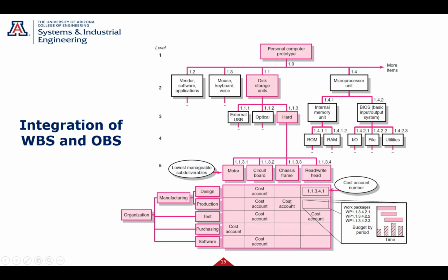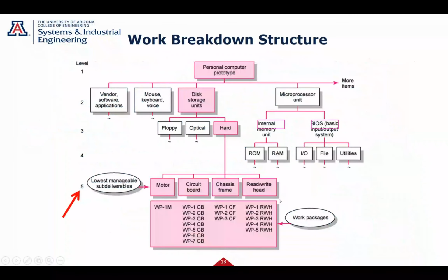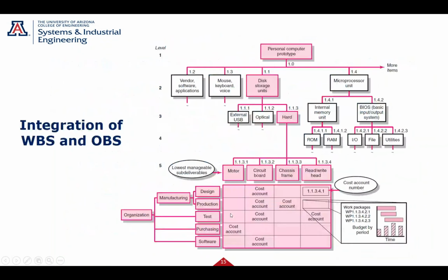Okay, so chassis frame, maybe it's here. So now I break down those work packages that we had all the way up here. These were fictitious, pretend we had them. And I'm going to break each of those down to what organizations they are. Some organizations could have 2 work packages or more, but you still are separating it into chunks that are measurable. So this is going to get us that work package by organization.